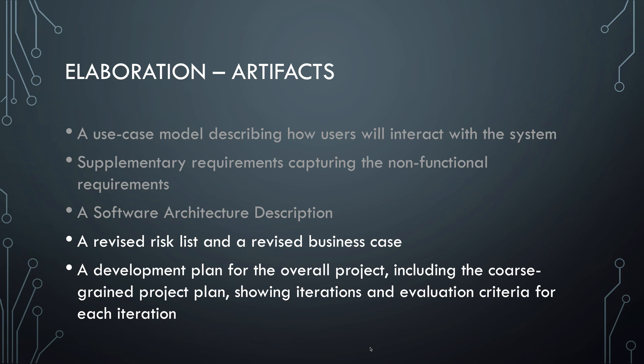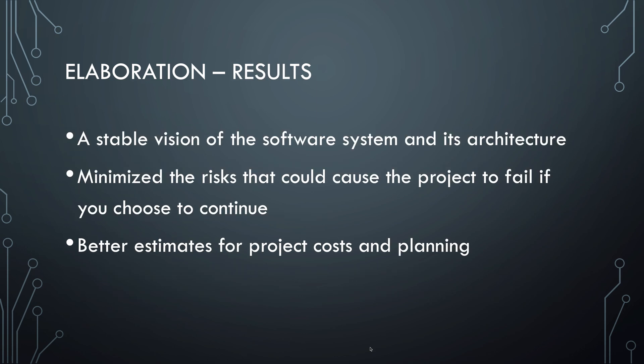There will also be a more detailed project plan that takes the insights from the phase into account. So what does elaboration give us? We now have a more stable vision of what the software is supposed to be and what its architecture is composed of. We reduce the number of risks by building prototypes. And finally, we have a better grasp on how much time the project is going to take and what it will cost.